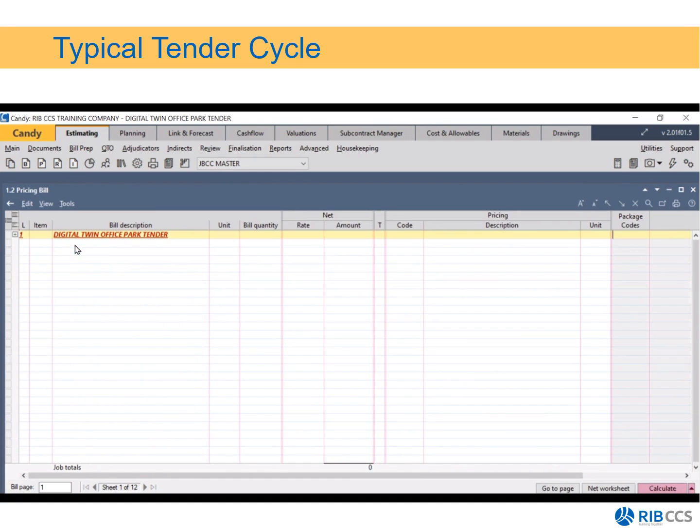I'm now going to close all my level headings, and we need to firstly understand which trades are going to be sent to my subcontractors. So looking at this job, P&G's, the main contractor will price the earthworks. The main contractor will do there isn't much. Concrete and masonry will also be by the main contractor. So the waterproofing and the paint work would be sort of specialist trades where we would require subcontractor quotes.